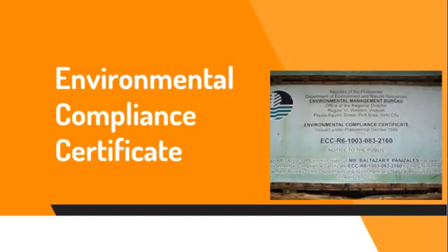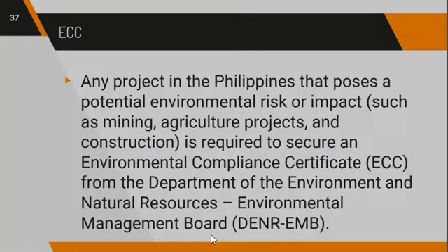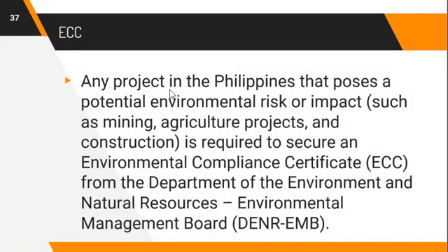So, environmental compliance certificate is very important. This is an example. Okay. So, what is this? The ECC is required for any project in the Philippines that poses a potential environmental risk, such as mining, agricultural projects, and construction. Therefore, they are required to come up with an environmental compliance certificate.